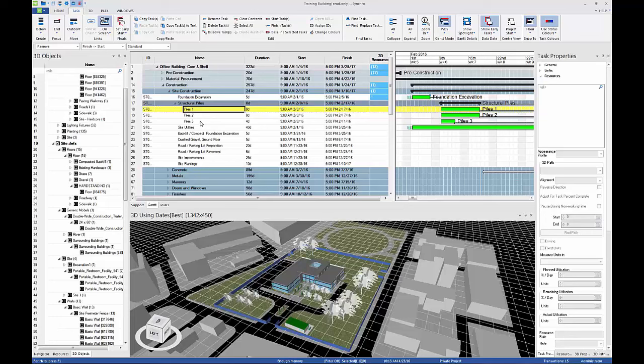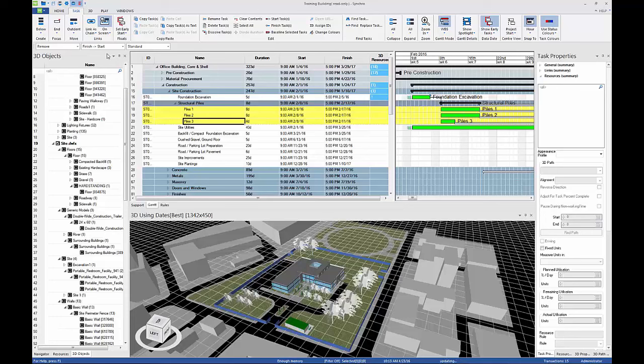Select Piles 1, hold Shift on the keyboard, and select Piles 3. Choose the Finish Start Link Type from the Fast Options toolbar.